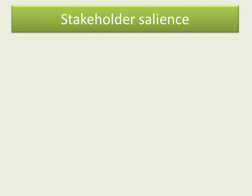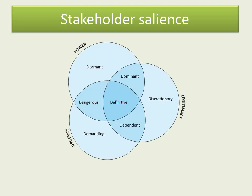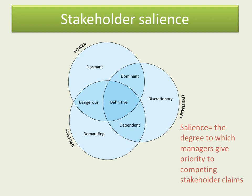The other widely cited model is the salience model, which shows three intersecting circles: stakeholders can have power, legitimacy, and urgency. The definitive stakeholders are those where all three circles overlap. Salience is the degree to which managers give priority to competing stakeholder claims, so the people with the biggest claim are the definitive stakeholders. The model has seven different areas, making it not the easiest to learn, but it does offer a different viewpoint on how to assess which stakeholders should have priority.